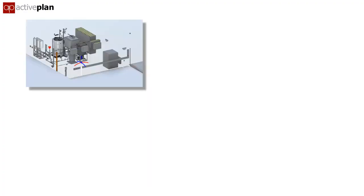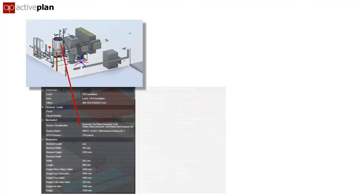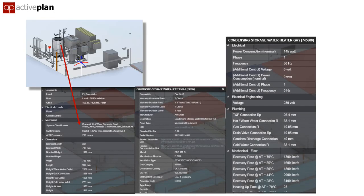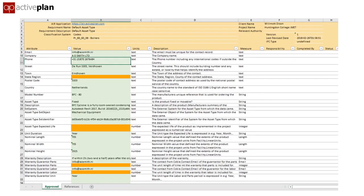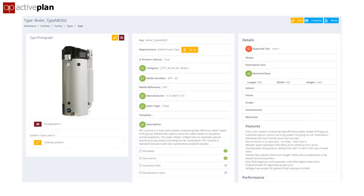If the contractor wants to add the required data into the model, they can, and we can extract it from there. But it's probably easier for them to use the spreadsheet templates Activeplan generates. The spreadsheets can be pre-populated with the information already added by the designers, with the fields they need to complete highlighted. However, the simplest way for contractors will be using the growing product library, where most of the data is already validated.